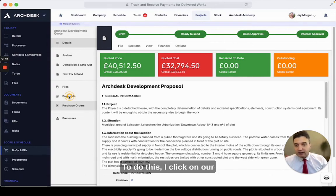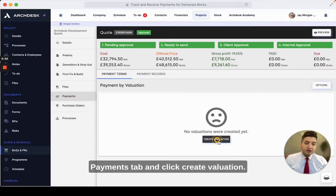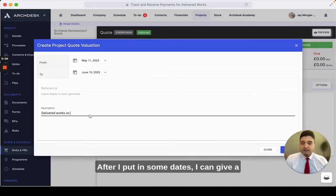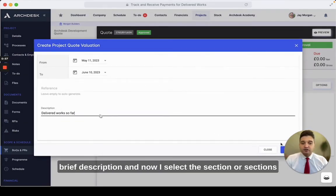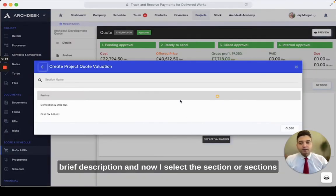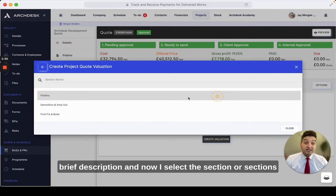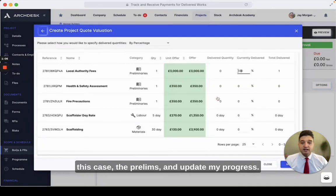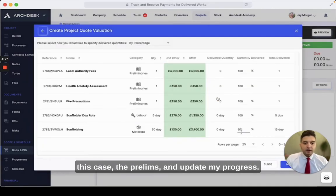To do this, I click on our payments tab and click create valuation. After I've put in some dates, I can give a brief description, and now I select the section or sections of work that I want to get paid for — in this case, the prelims — and update my progress.